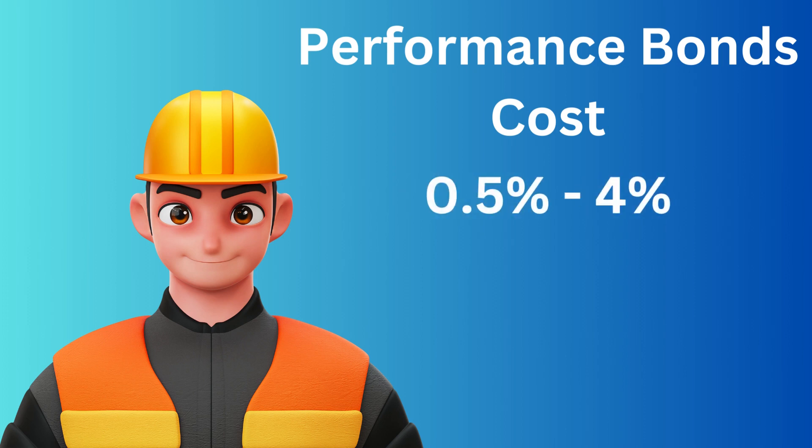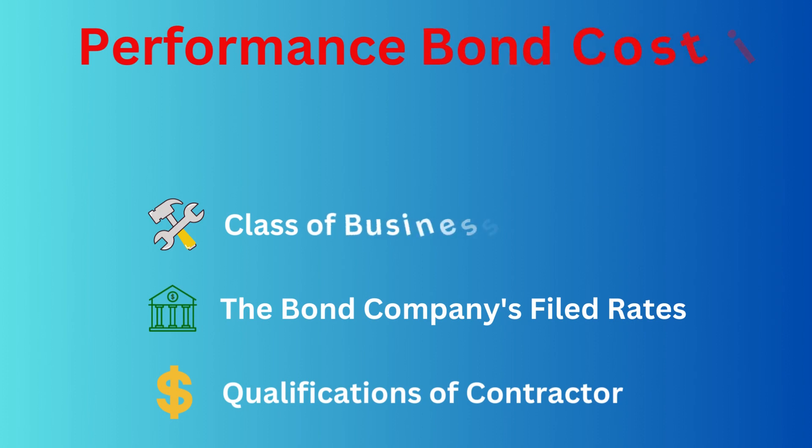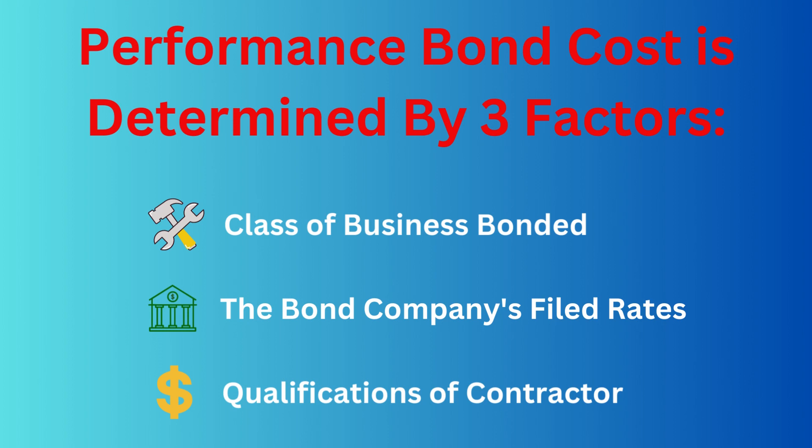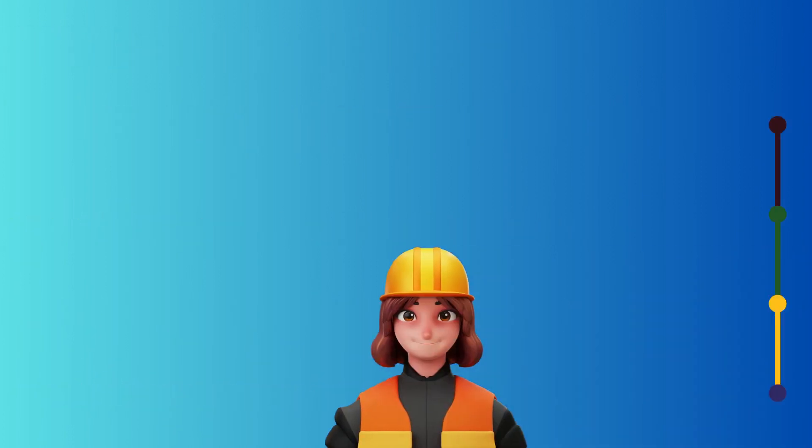Learn more about how these rates are determined and how to improve them. Performance bond and payment bond rates are determined by three factors: the class of business that is being bonded, the underwriting strength of the contractor being bonded, and the surety bond company's filed rates in the state where the work is being performed.